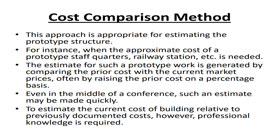Cost comparison method: This approach is appropriate for estimating the prototype structure. For instance, when the approximate cost of a prototype staff quarters, railway station, etc. is needed, the estimate for such prototype work is generated by comparing the prior cost with the current market prices, often by raising the prior cost on a percentage basis. Even in the middle of a conference, such an estimate may be made quickly to estimate the current cost of building relative to previously documented costs. However, professional knowledge is required.